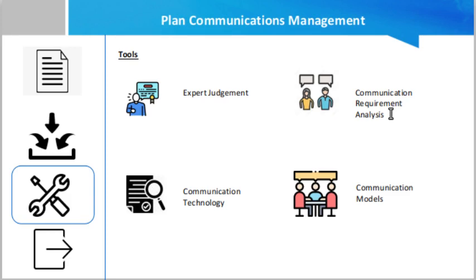These requirements are defined by combining the type and format of information needed with an analysis of the value of that information. If we talk about communication technologies, which are the methods used to transfer information among project stakeholders, they may vary significantly. Common methods used for information exchange and collaboration include conversations, meetings, written documentation, databases, social media, and websites.